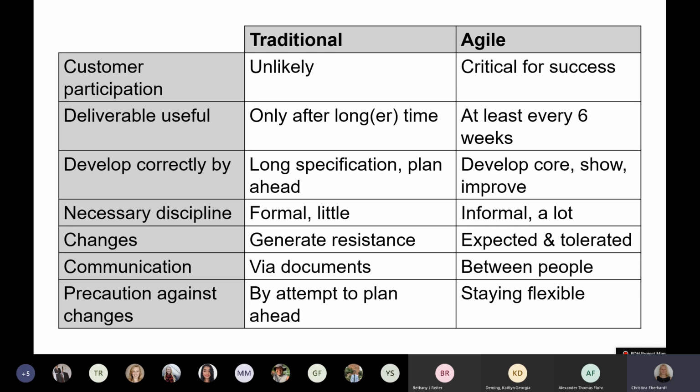And in agile processes, usually you have a deliverable every 6 weeks, and that way the customer really knows where the project is at, and they feel like they are involved in the process, and they're usually more happy with what they get, because after 2 years you handed in some document at some point, and the technology changes, so sometimes you might want to have a little change in the middle where it's like, oh yeah, I thought this would be amazing, but now looking at it, it is not, so can we please change this slightly to portray this? And in the agile process, that's something that is done really quickly and easily.